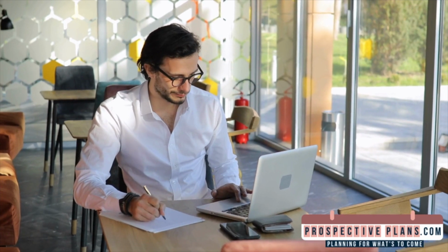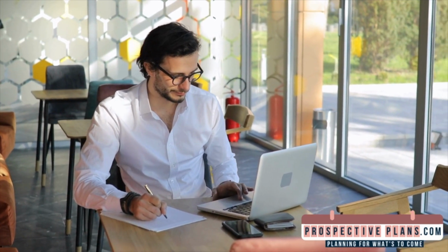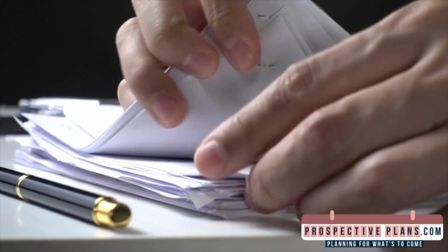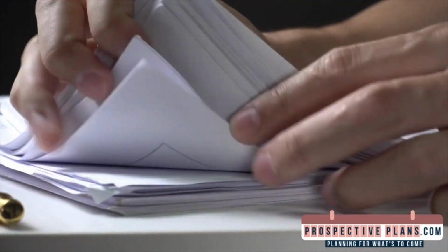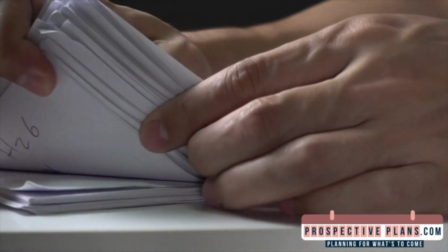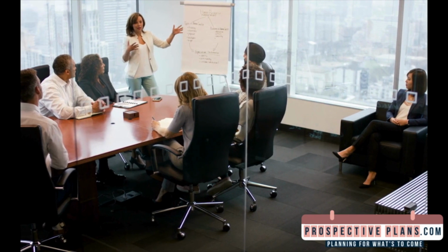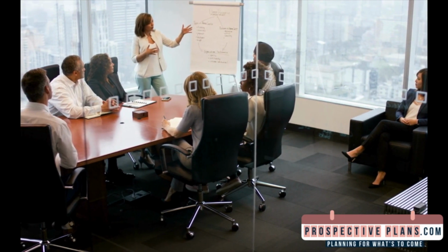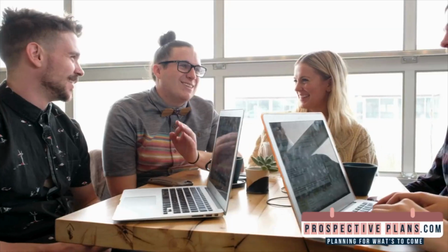Even with the best board and procedure in place, when a project first begins, it is meaningless unless it takes into account the present situation. Designate a project manager who will be in charge of updating the board every day or at least once a week if you're utilizing Kanban to handle team projects. Include a thorough examination of your boards in your weekly review if you're utilizing personal Kanban for your own projects.